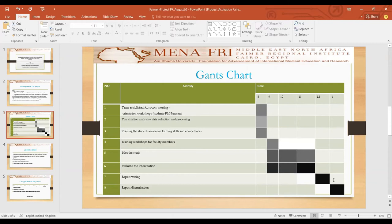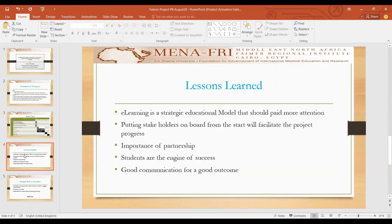Writing the report and dissemination of the results will be at the end of this year. However, the dissemination of the results will take place only after the report has been completed. Concerning the lessons learned, I would like to mention the experience that I have gained during this period.